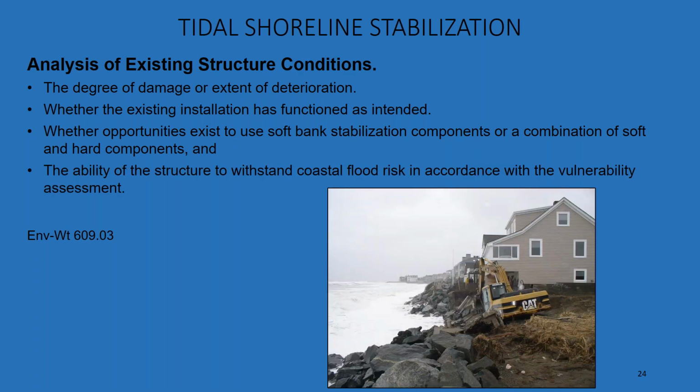With the new rules, we also look at our existing structure conditions. What's the damage extent? Whether that existing structure has functioned as originally intended, and if there's any opportunities to soften the bank, and what's the ability of this structure to withstand coastal flood risk in accordance with the vulnerability assessment.